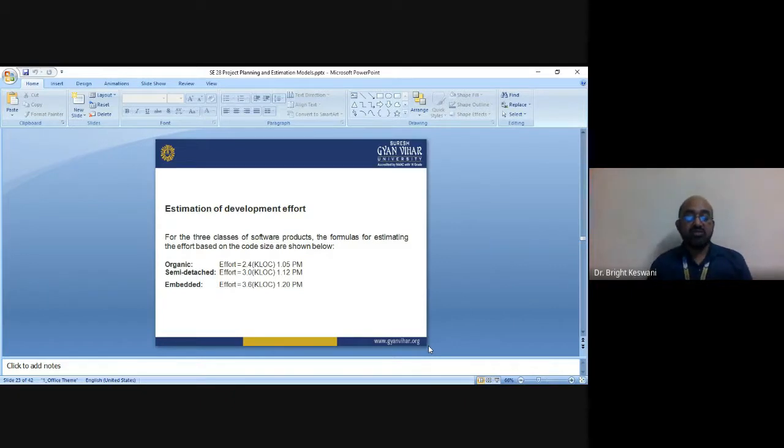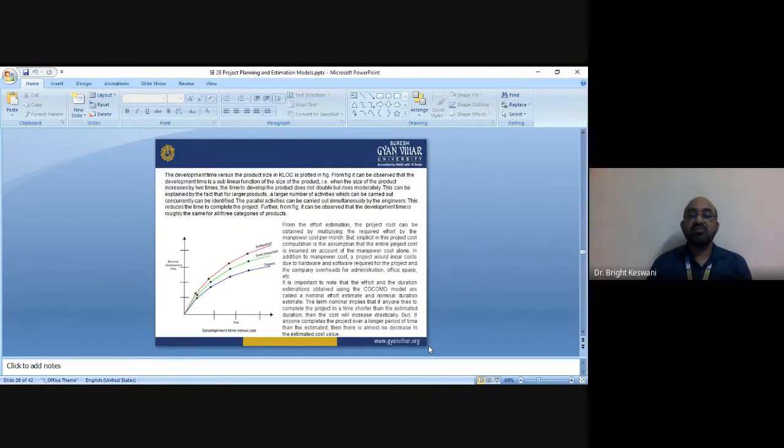Staff requirements for a project are small during requirements, and maximum during implementation and testing, and then drop down again. The software phases of integration and testing have more stress. Let us discuss the Rayleigh curve.